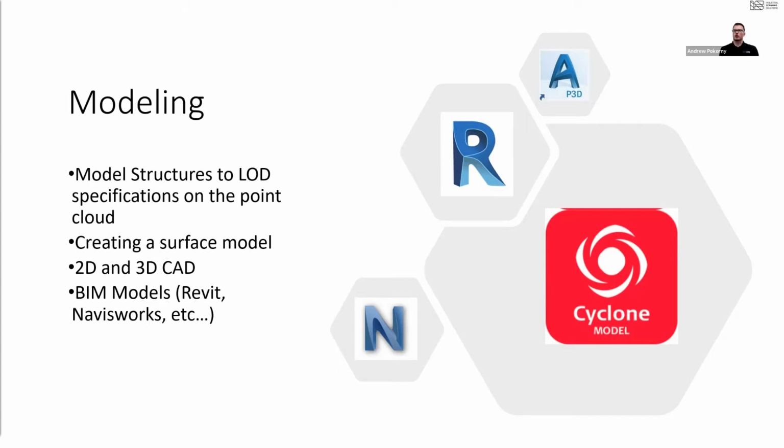It's important that when we do our modeling, we have a really good relationship and a lot of communication with the owner, or the engineering service provider, so we can capture the level of detail they need, and not so far beyond that we're wasting time and money detailing out things that don't need to be seen. We invest that time and expense into the areas that are really critical. So the communication is a big aspect of it.